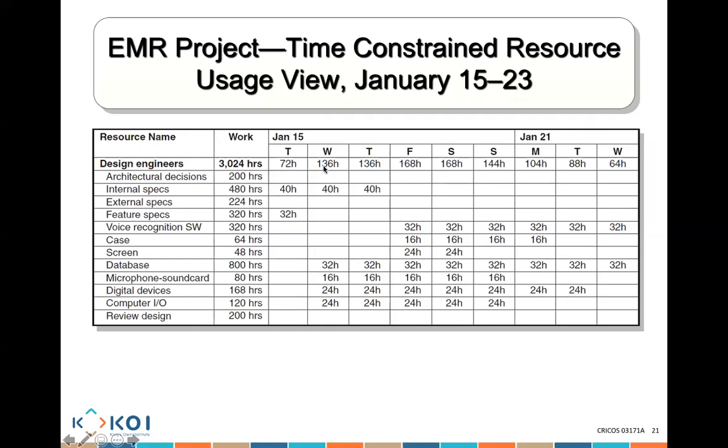What about on Wednesday? Do I have enough? No. Thursday, I don't have enough. Friday, I don't have enough, and so on. Which day do I have enough resources? Wednesday only, the 23rd of January. I only have one day with enough resources, and for every other day I do not, which means all of these activities that require more people need to be pushed forward because I don't have enough people.